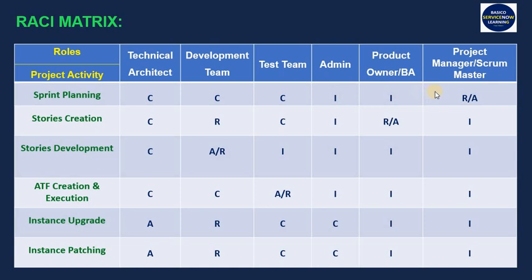For the activity of story creation, R and A move to the product owner — meaning the business analyst is Responsible for creating the stories and is also Accountable for that activity, taking ownership of it. We can give R and A to a single role, or to separate roles — it depends on what roles and responsibilities are being assigned to whom. In this way we can prepare a RACI matrix.